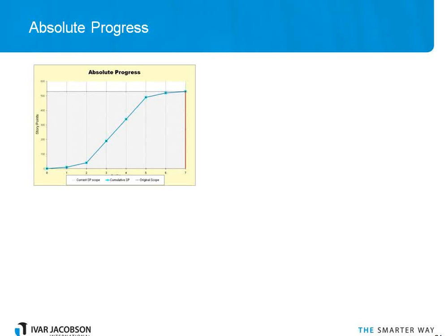And then each iteration we are scoring some story points. Now those story points could be related to user stories or use cases or even features. You can even use story points with declarative requirements. It just gives us a relative effort here, so we're measuring our story points. And you can see in this case we've got the classic S-curve. This is what you'd expect for a high-risk project. To score the story points, the piece of functionality, the requirements must be implemented and tested. So if there are defects, we won't score that in terms of progress.